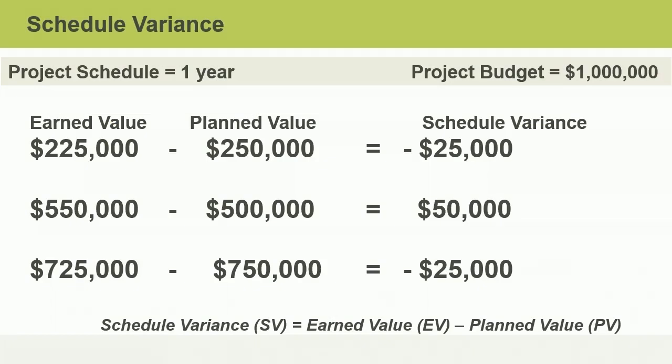When you are monitoring and controlling project work, it starts with gathering work performance data such as planned value and earned value. These raw data points only become meaningful when you compare them and start to identify variance between actual project performance and planned performance. This meaningful work performance information tells you whether the project is ahead of schedule, right on track, or behind schedule.